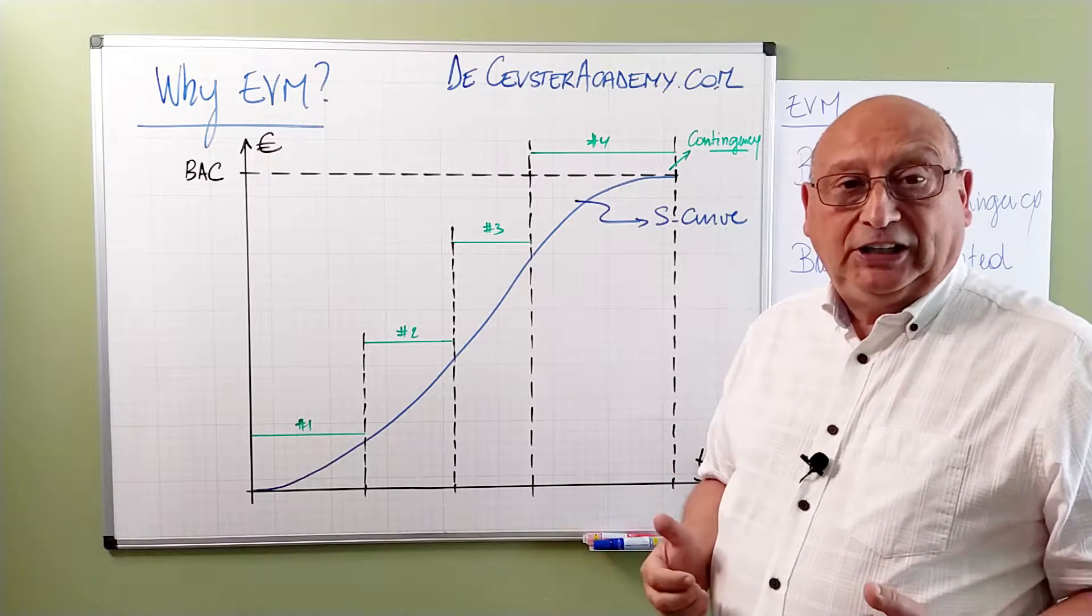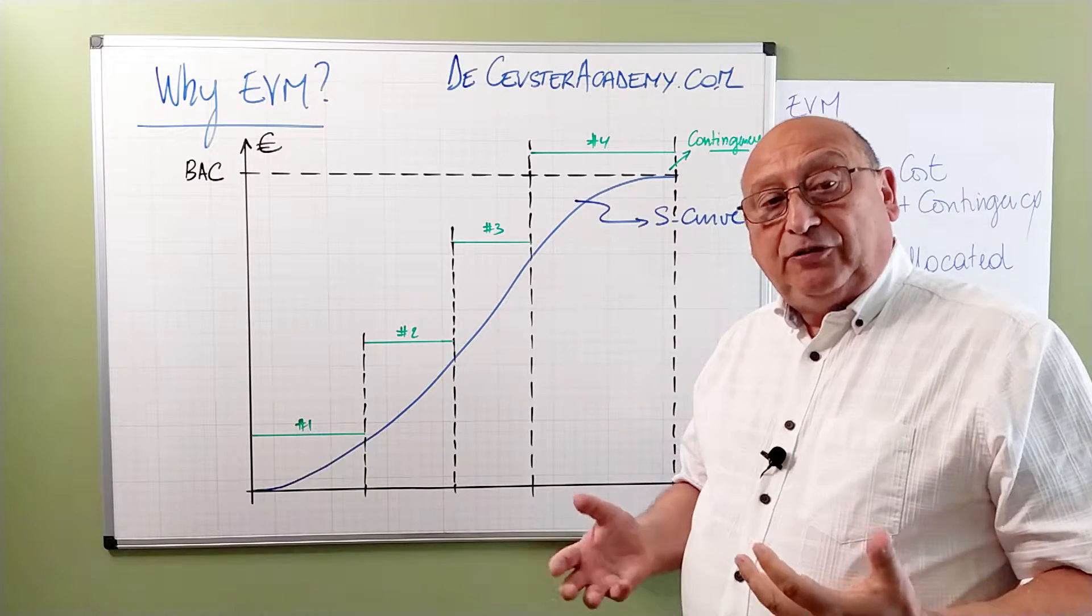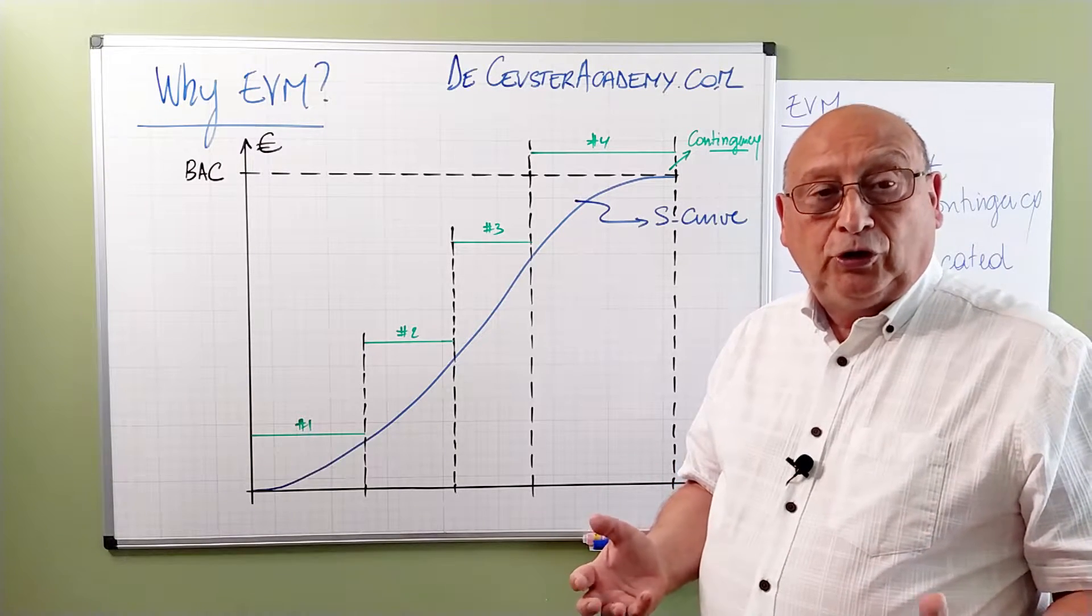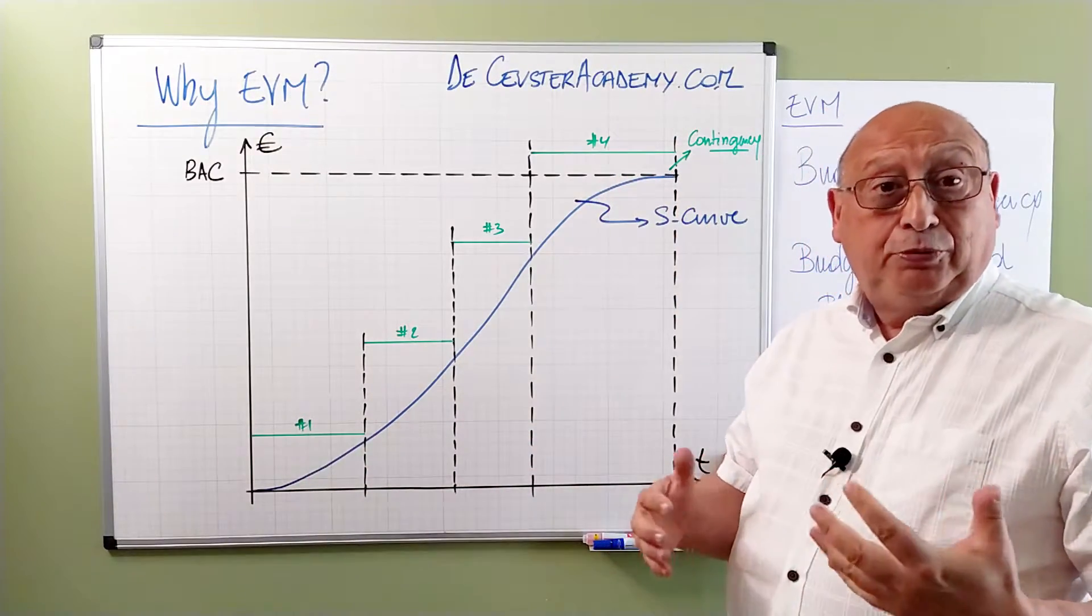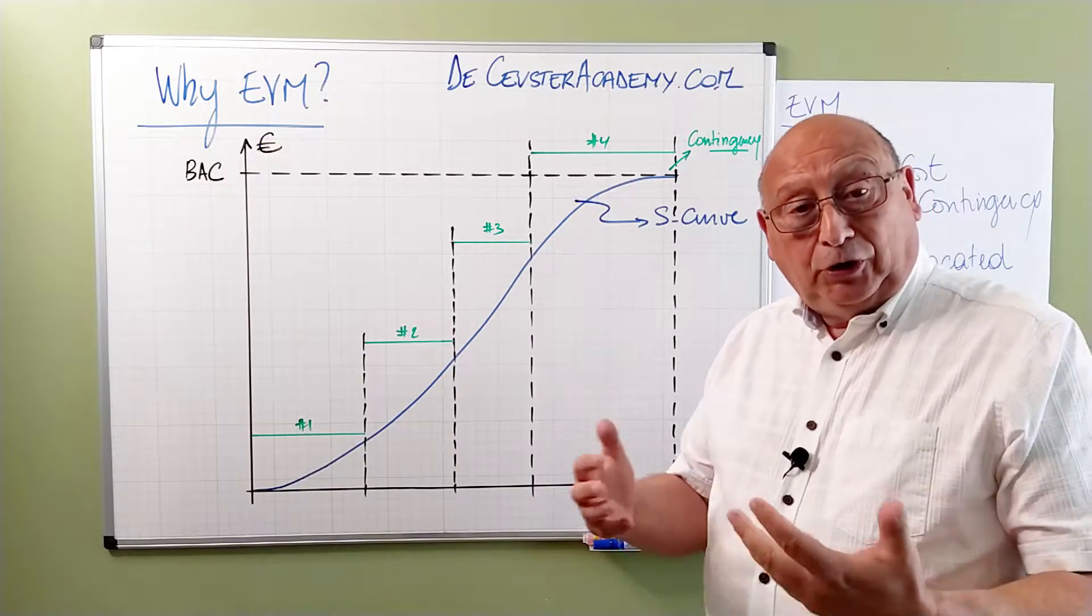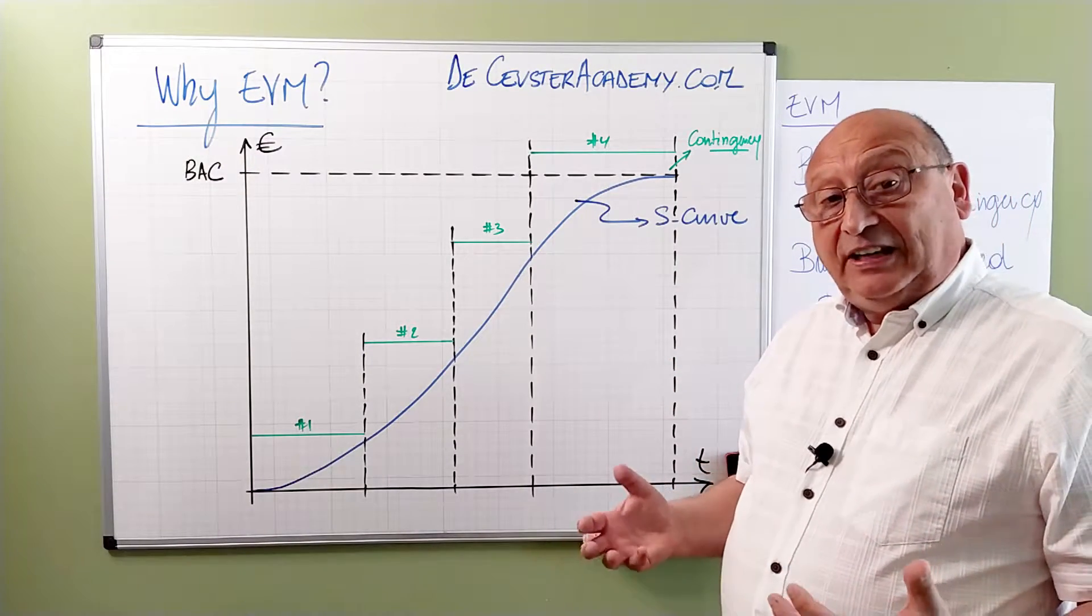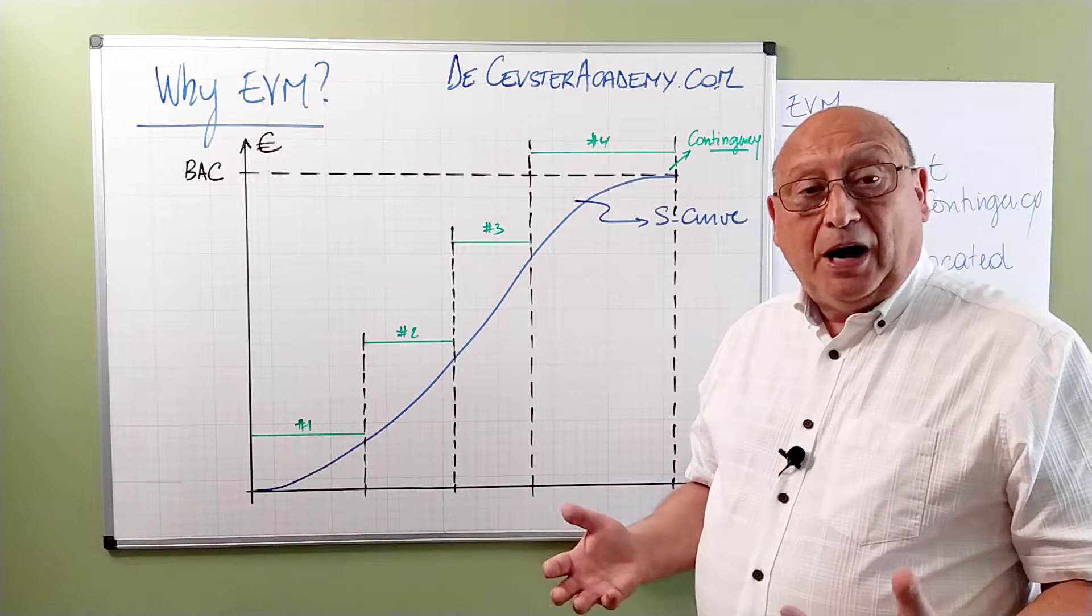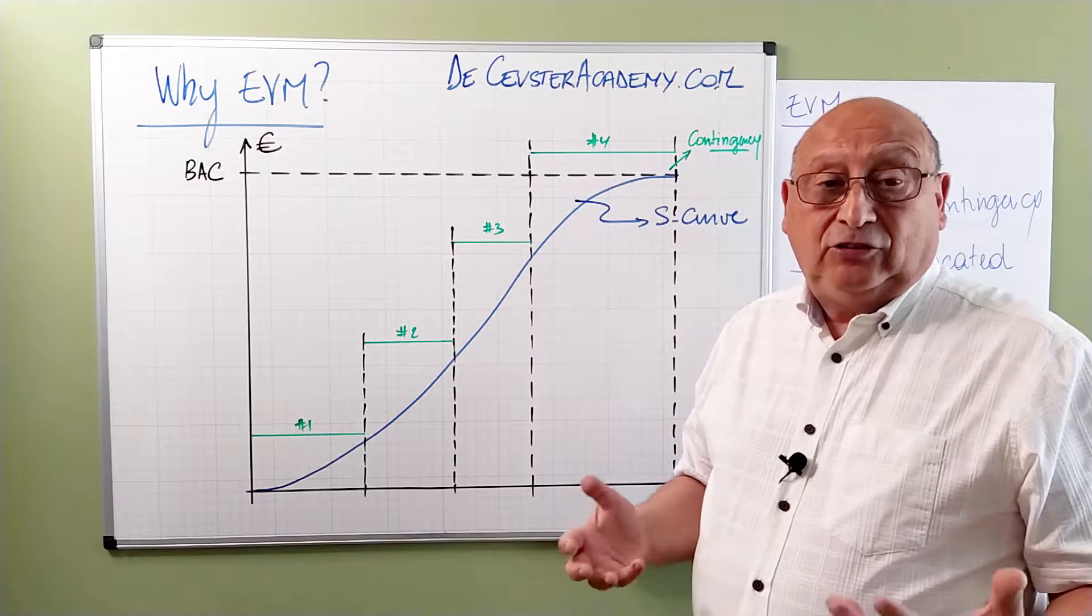Budgets are typically allocated over different periods. Once a project is approved, there is also a budget approved for separate parts of the project. For example, the first budget here is approved for the first part of the work. By the time we reach the end of that budgeting period, we get more budget, and so on until we finish the project. What we are going to look at now is what happens at a certain moment and what can be a problem with the information that we have.